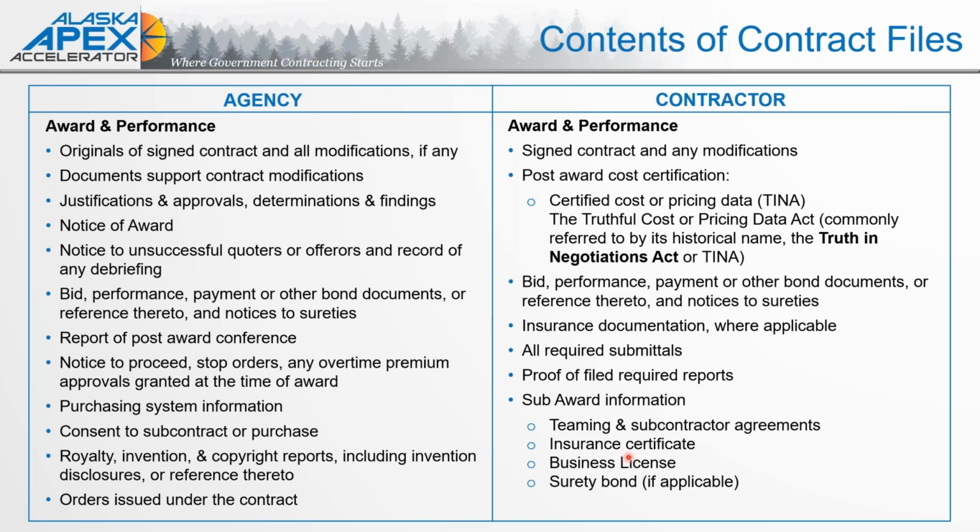If that 1099 employee or that single owner small business subcontractor was working on site, working on your contract, and it turns out that they were not licensed or insured, well, technically, according to the Department of Labor, you didn't have a subcontractor. You had an employee that you now owe wages, back wages, and of course, medical and dental and all the other things that you should have been providing as possibly outlined in a wage determination.